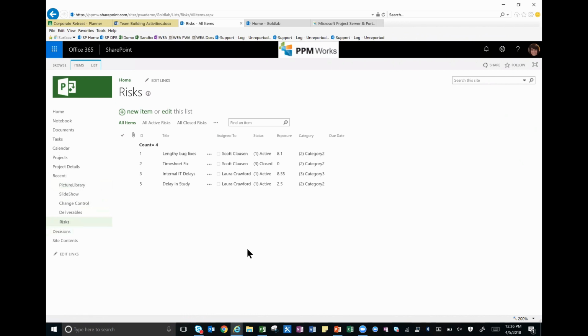So Planner is fantastic when you have smaller things that you're planning for, more individualized work, not a formalized team, things like that. When you have a formalized team, more of a long-term project that's going to require understanding how the tasks all relate to each other with dependencies, and how having resources report to their tasks and see how they're working across all the projects in the organization, that's when you're going to want to start using Project Online.